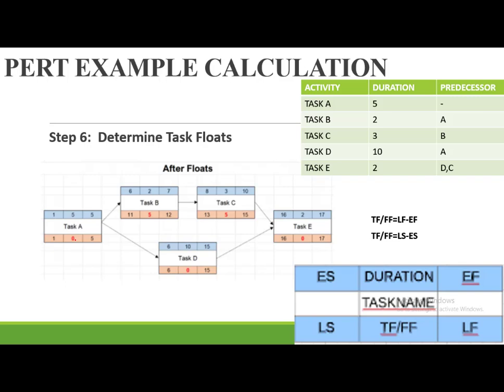So what does this tell you? There are a number of things that we are going to note at this given point. One is that activities with a slack duration of 0, or a free float of 0, or a slack time of 0, those are activities on the critical path. Those are activities that cannot be delayed even with 1 day. Let's give an example.